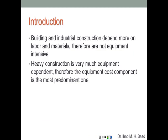Building and residential construction depend more on labor and material, so they are labor and material intensive. However, heavy construction — highway construction or heavy civil projects — is very much equipment dependent. The equipment cost component is the most predominant one. When you think about a pavement project or heavy earthwork project, the cost of the equipment is predominant because the earth is already there, so the cost of excavating, transporting, and compacting is predominantly equipment cost with some labor component as well.